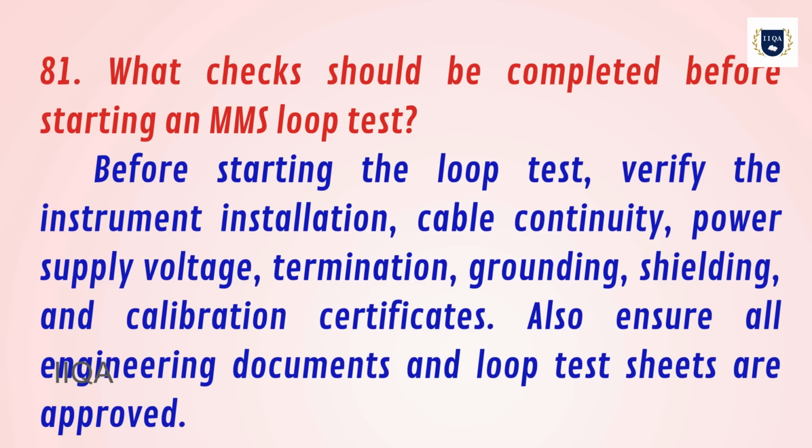81. What checks should be completed before starting an MMS loop test? Before starting the loop test, verify the instrument installation, cable continuity, power supply voltage, termination, grounding, shielding, and calibration certificates. Also ensure all engineering documents and loop test sheets are approved.